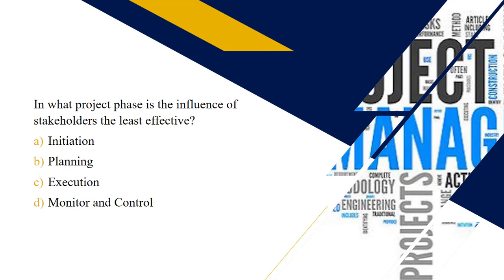Next question: in what phase of the five project phases is the influence of stakeholders the least effective? Hopefully you chose choice D — monitor and control. While stakeholders start out with a lot of influence on the project, it decreases as the project advances because execution solidifies deliverables at the expense of stakeholders being able to change their minds.